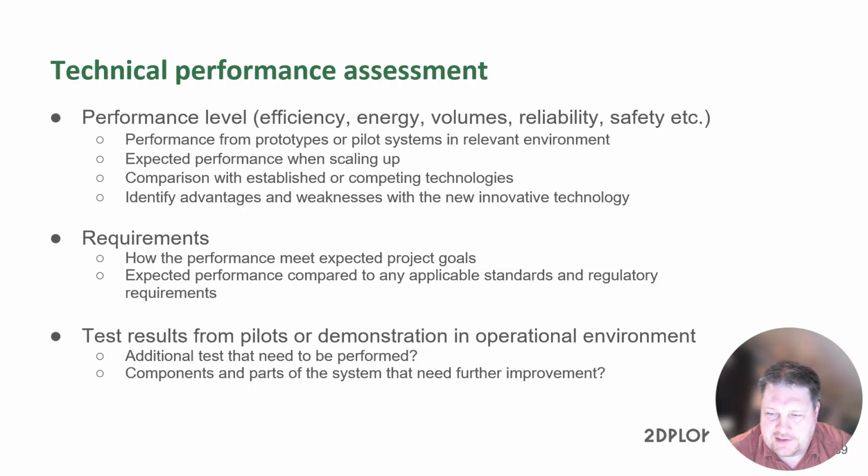So the first years, you're not likely to have the full performance of your plant. But as the years go by, you will solve and optimize more and more of those small problems during the experience of developing your plant.